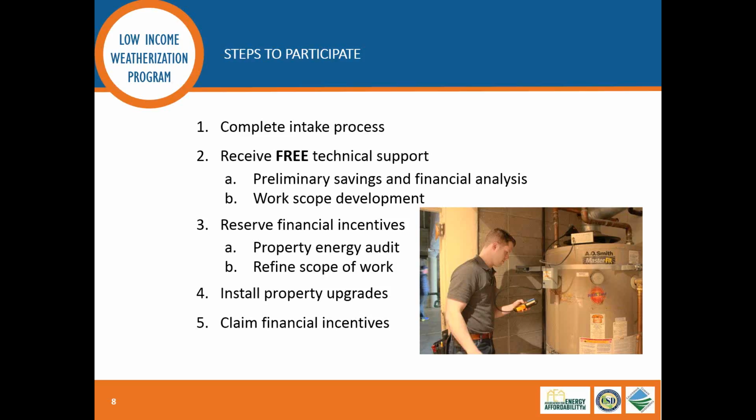So up front, we'll have what the maximum rebate amount will be, but then at the completion of the project, we're going to need to collect documentation on actual costs as well as details of the other rebate programs which participated. Then we just need to make sure that the LIOP incentive isn't such that they got more money than the project actually costs. If that's happening, we either add more scope to the project or we reduce the LIOP incentive accordingly. Great. Yep.